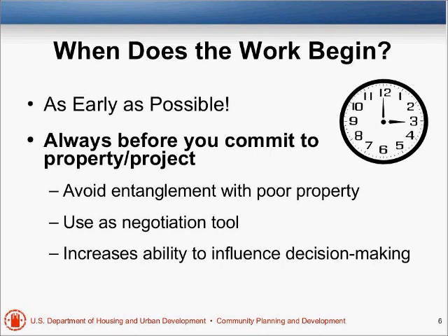So my message to you is, as soon as you start talking to people about, gee, what about this site? What about this developer? You start saying, you know, we're going to have to do an environmental review. Let's look at floodplains. Let's look at wetlands. Let's look at historic resources. Let's look at contaminated sites. And the earlier you start it, the more you'll be able to affect decision making.